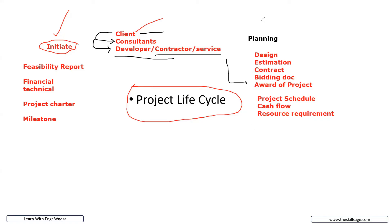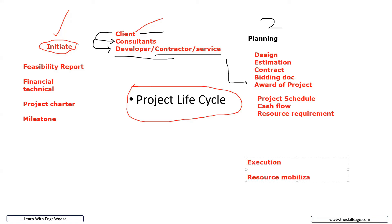The third phase is the execution phase — this is the practical phase where work actually starts. The major activity is resource mobilization: your crane, site engineers, chemical engineers, civil engineers, and all required staff move to the site. You set up caravans and temporary buildings and facilities so that you can stay on site and continue work.